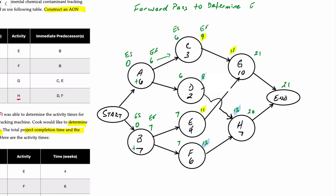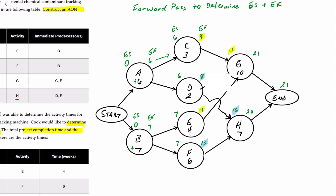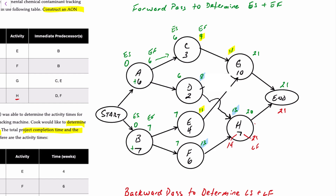That's the forward pass, used to determine the earliest start and earliest finish times. We're also asked to determine the latest start and latest finish, and for that we use a backward pass, working backwards through the diagram. The latest finish time for the project is 21 weeks. Because the last activities are G and H, the latest that H can be completed is 21 weeks; 21 minus seven gives us 14 weeks. So 21 is the latest finish and 14 is the latest start for activity H.